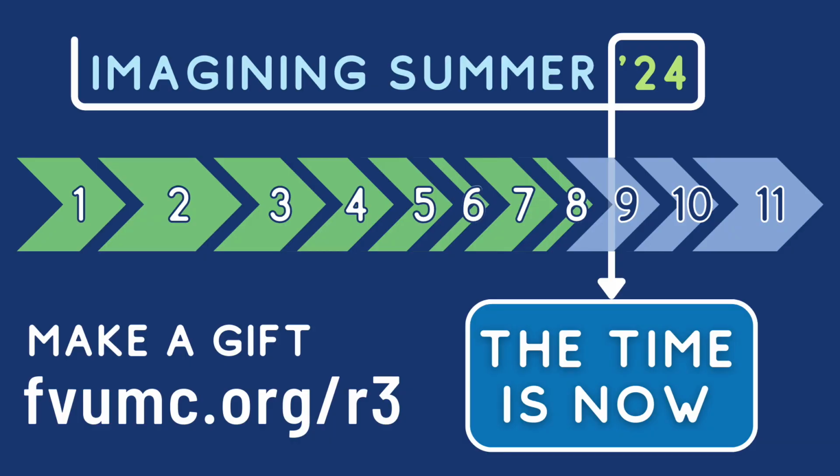So here's why I say that now it feels like a crucial time to me. Again, let's return to this idea of value engineering, right? There's lots of parts and pieces to that. But one of them is that if you can get people out one time to do several things, versus asking them to come out several times to do one thing each time, we can save money, right? When we made our original projections about how much each project cost, we assumed that project would be done on its own. So when I say that I think by next summer, we can get from project 1 all the way to project 7, or maybe even project 8, this is what I'm talking about, right?